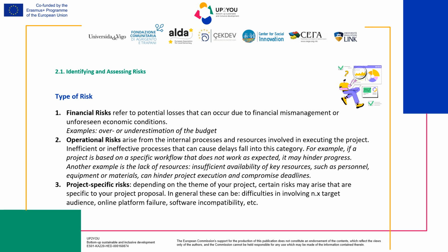Operational risk. This risk stems from internal processes and resources within the project. Inefficiencies or ineffective workflows can lead to delays, impeding the project progress. For instance, if a specific workflow does not perform as expected, adjustments may be needed to prevent project stagnation. Another common operational risk is resource insufficiency. Limited availability of personnel, equipment, or materials can delay execution and compromise the project schedule.